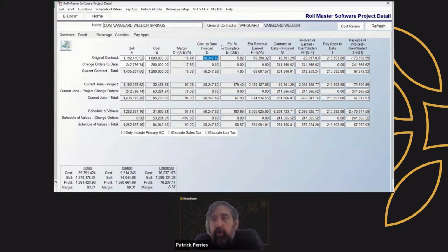Now, if you are doing jobs with revenue and cost on them, this is just coming from your invoicing, and you're going to have some revenue hit and some cost hit. If you're doing the operational jobs like I spoke about, then these operational jobs get closed out like any other job. They get invoiced. They're zero value, so they're not hitting AR. You're not going to mail a zero invoice to the client, but they got to get closed out to relieve that inventory and recognize that cost.